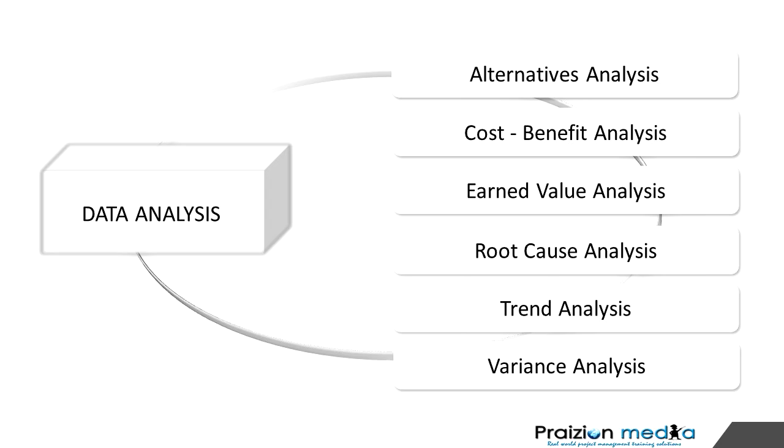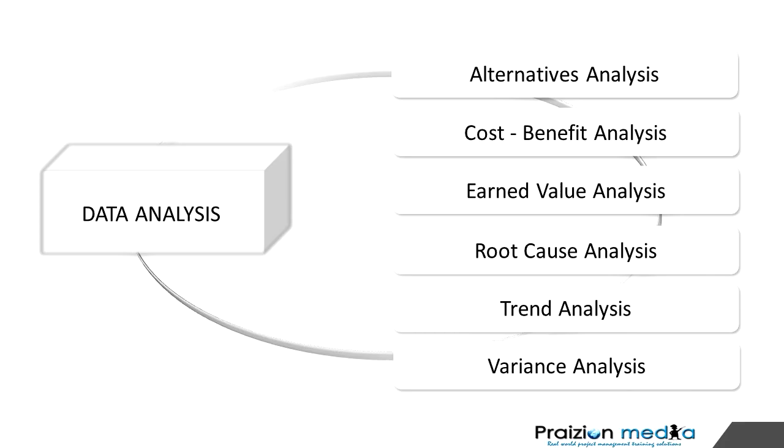And we also have another type of analysis called variance analysis. Variance analysis seeks to understand why there are variances on your project. Variances between actual and planned, for example. Variances between your actual cost and what you planned. Variances between the scope, what you got done versus what you planned. Why did you get all this done when this is what you planned? There's a variance, a discrepancy. So we do variance analysis at various points on the project, actual versus planned, and it could be time, cost,